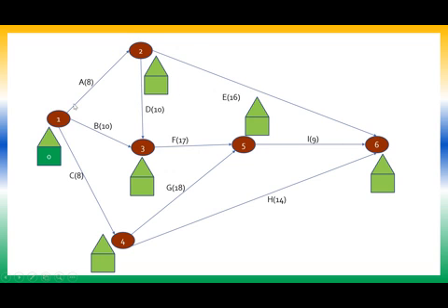Okay. So now for the network diagram, for the forward pass and the backward pass, create rectangles and triangles. Now for the first rectangle, we always assume the initial value to be 0. So 0 plus 8, I get 8 here. Then 0 plus 8, I get 8 here also. Here I am getting two inputs. One can be 0 plus 10, 10. The other one can be 8 plus 10, 18. Whichever is maximum has to be written. So 18 is maximum. I have written that.